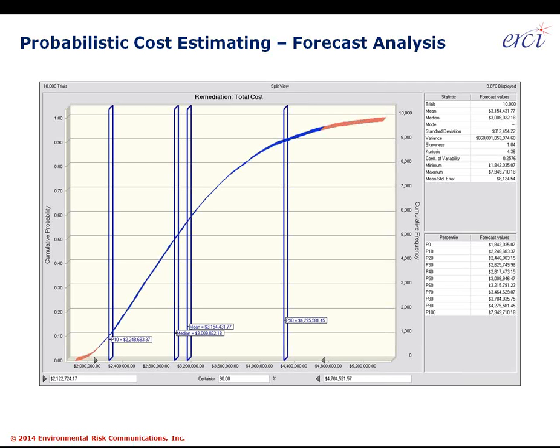One point I want to point out is Crystal Ball and @Risk are absolutely great for recording the number of trials. In our experience, if there are 4 or 5 assumptions at least, it generally takes at least 2,500 trials to get a good Monte Carlo simulation. It's the difference between running a model for 30 seconds versus a minute. But if there are more than 5 assumptions, there's probably some thinking or screening that needs to be done by a project team to get to a reasonable and accurate project cost range.